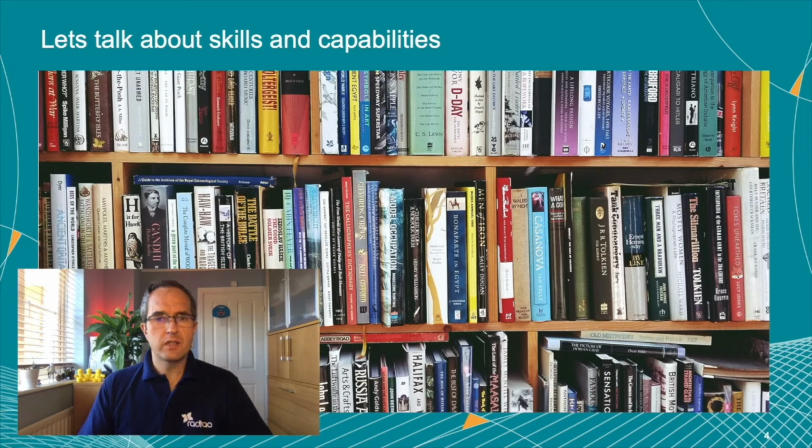It should go without saying that the PO for the system team needs a solid grounding in the act of being a product owner, like any other PO in the organisation. This includes the normal duties and functions like how to handle incoming demand, document it as stories, collaborating with other POs and PMs at the ART Sync meeting, and prioritisation. They should also have a customer focus too, which for the system team is mainly the development teams, but also includes the ART leadership and business owners. Like any team, making sure they don't forget who they serve and why.